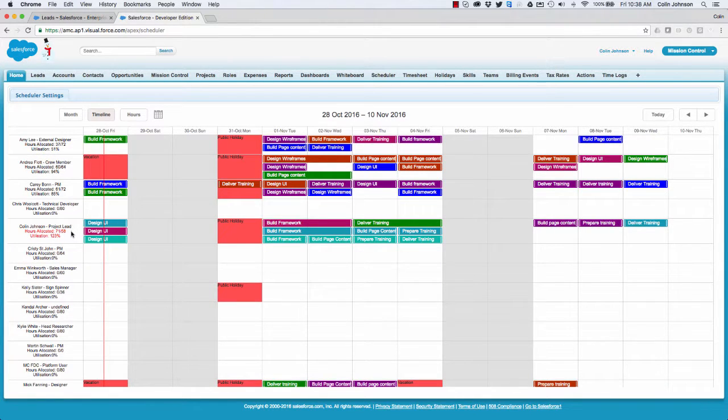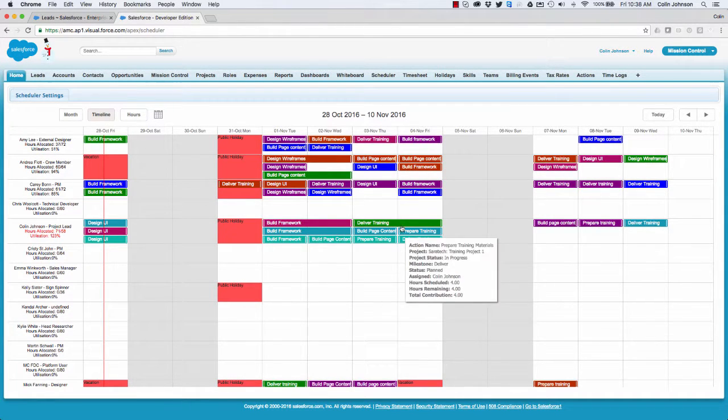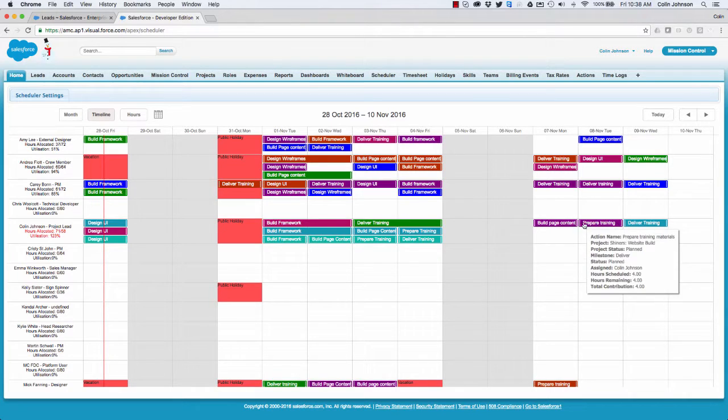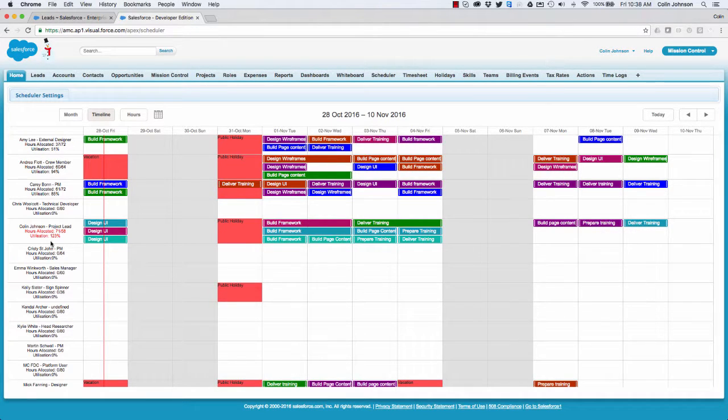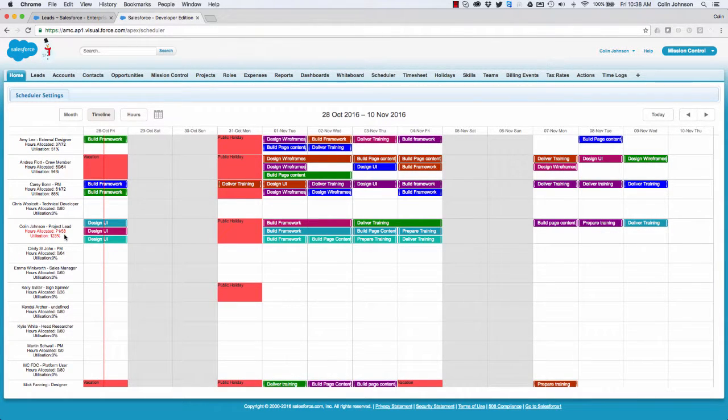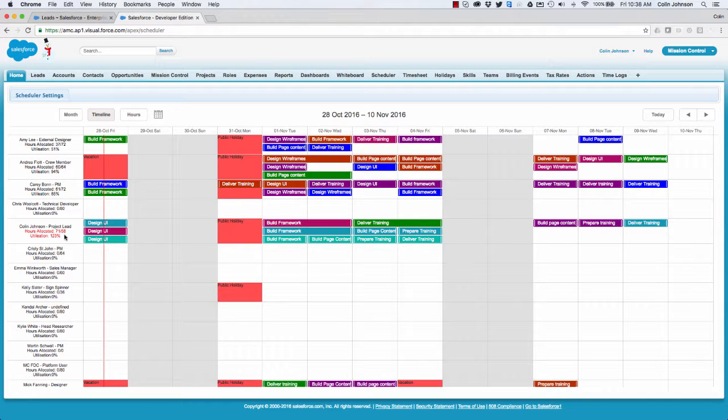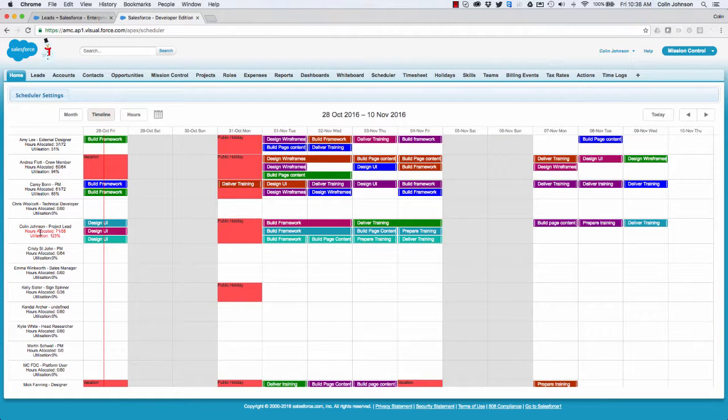So back on my record looking at it today, you can see I've got lots of different actions assigned to me over the next two weeks. And it's flagging up I've got 58 hours available but I've been given 71 hours worth of work to do. So there's a bottleneck on me as a resource, so it's flagging up red just to show us that we need to try and address that bandwidth.